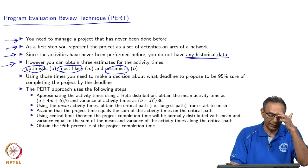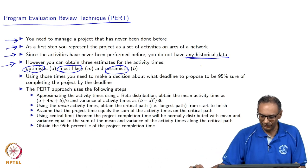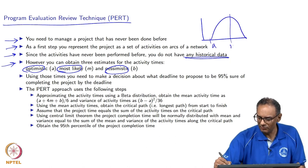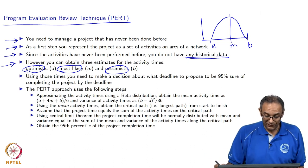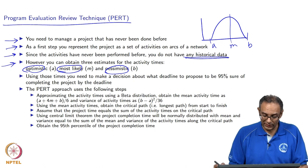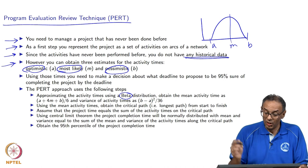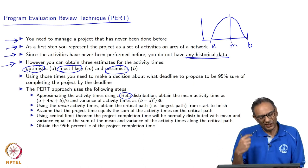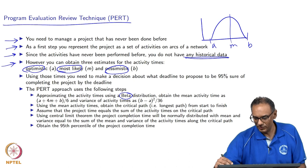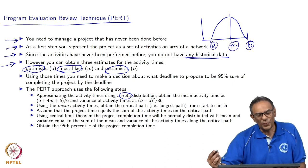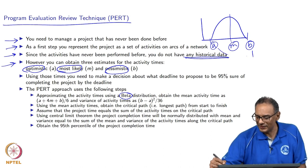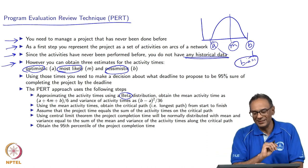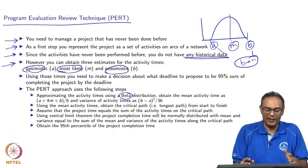B is the pessimistic worst-case time, M is the most likely time (the mode of the distribution — that is why it is called M), and A is the optimistic fastest time. The graph of this distribution typically looks like a skewed curve. We assume this distribution is what is called the beta distribution — specifically a three-parameter beta distribution with parameters A, M, and B. In the two-parameter beta distribution, B minus A equals 1; this three-parameter version is more general.